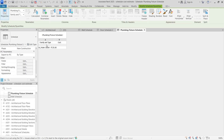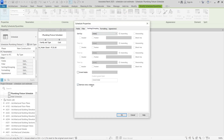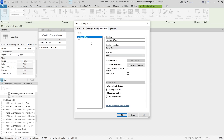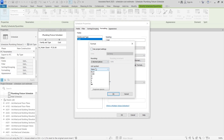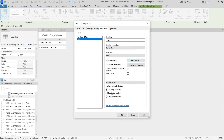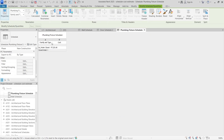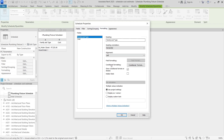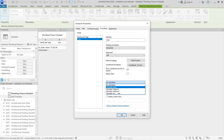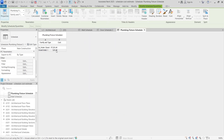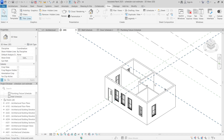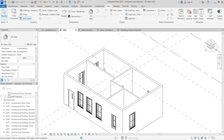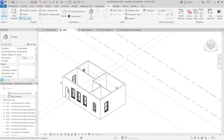To create a schedule for components, go to the Schedule tab and select by category. The water closet will be under Plumbing Fixtures. Add the Family and Type field and the Cost field, then click OK. Just like before, go to Sorting and select Grand Totals, then in Formatting turn on the dollar sign and enable Calculate Totals for Cost. Click OK — we have only one toilet so that's $25. This is how you can estimate the cost of your entire building, then take all the grand totals and put them in an Excel sheet to calculate the ultimate grand total.